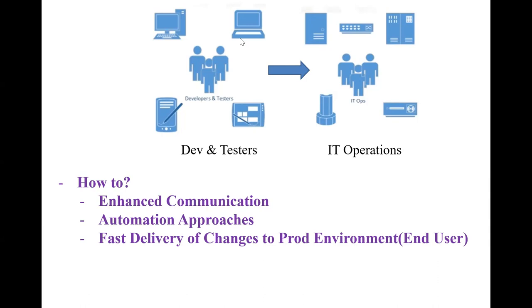For the waterfall model, do it correct once or do it again from the start. Yes, on the basis of the change, wherever it is required, it has to go back and review all the phases one by one. But the first time, yes, it is one time until release. But once it has been released, if you have any issues, it has to go back to that top level stage, identify where it is required to apply the change, and it has to reprocess once again.